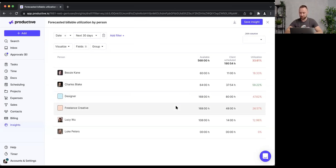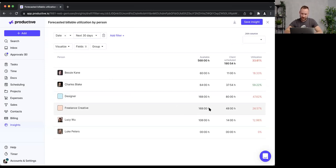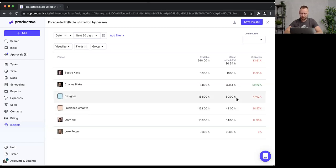Going back to placeholders: a creative placeholder shows 168 available hours but only 48 scheduled — I probably shouldn't hire that person yet, since the last thing you want is someone sitting around waiting for work. The designer placeholder shows 80% utilization with 80 hours scheduled — that looks like a more justified hire.